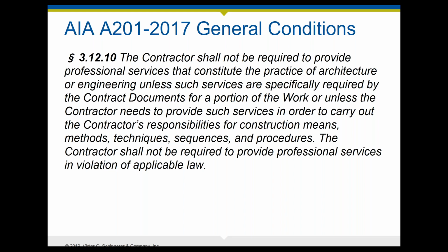Contractors either accept a risk knowingly and price it accordingly, or they try to employ contract language that really bifurcates the standards to which a contractor is going to be held. So they may submit a contract modification that says they will only be liable under a professional standard of care for the professional services the contractor is agreeing to procure or provide, either directly or vicariously, and then a contract standard for the actual construction work, the traditional construction work.